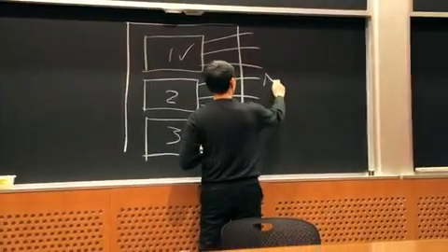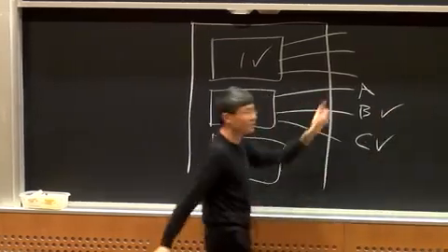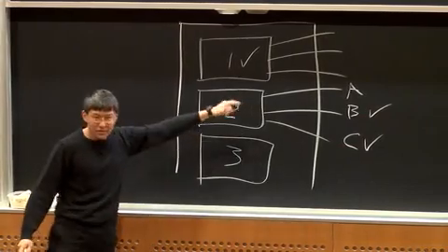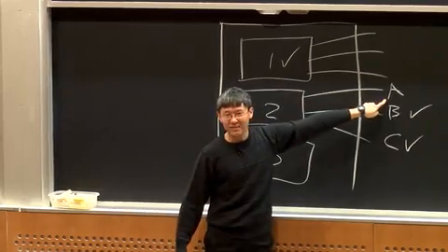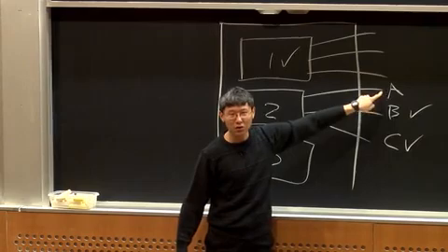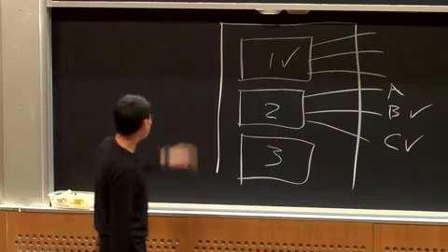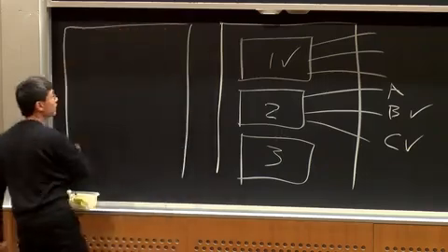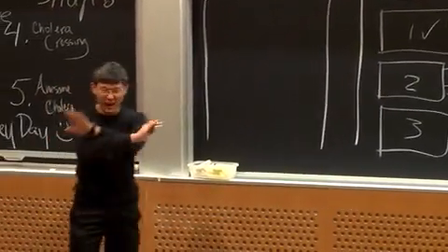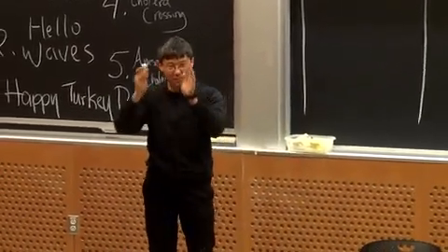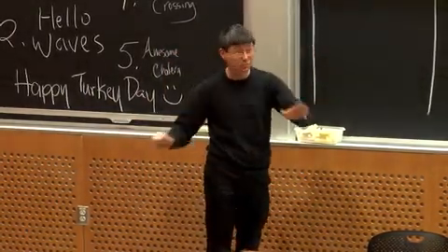And so this is person A, this is person B, this is person C, and person C's done their job, person B's done their job, and person A is still working on it. How complete is your game, actually? Your game's only as complete as person A is capable of finishing their task. So if I were to take this list of priority 1, 2, 3, and sat you down and went through the arduous process of giving each individual task a separate priority number so that you could actually sort it and rank it, I'm not going to do that because I know it takes a heck of a long time.